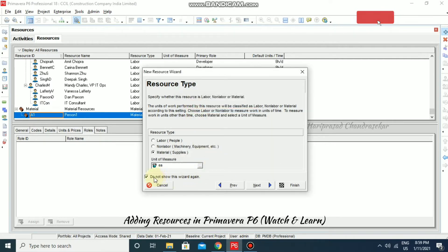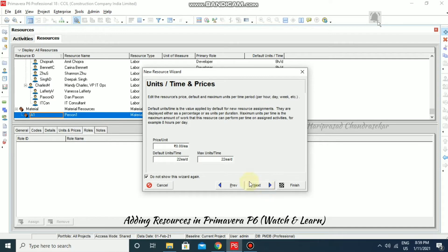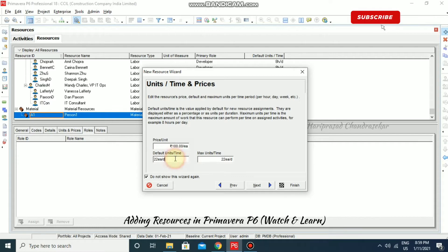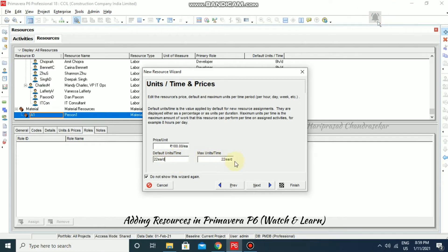I'm going for Next and it is asking for price per unit. I'm going to put 100. Default units per time — these things we can change later as well. I'm just going to leave that as it is.